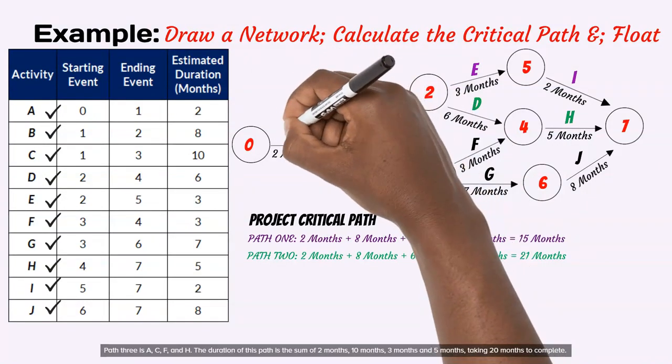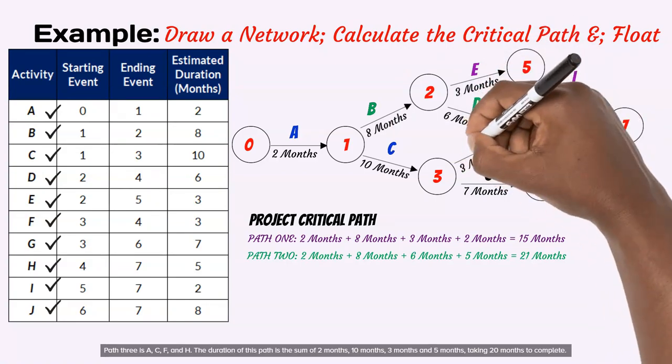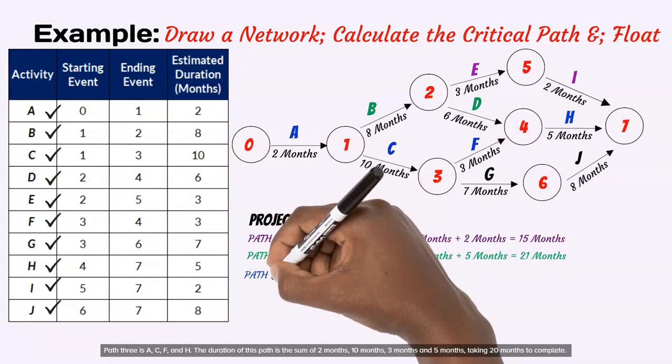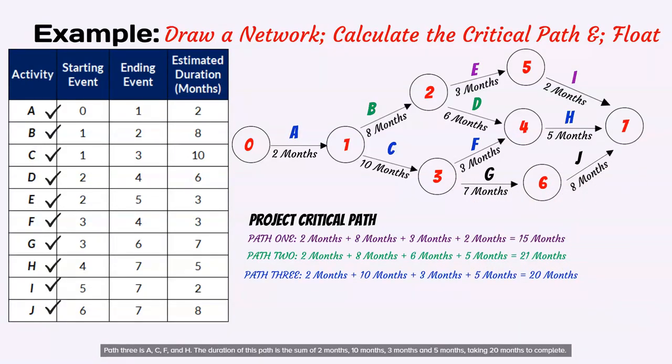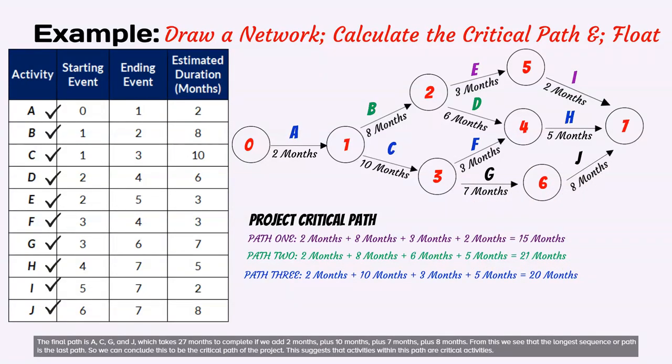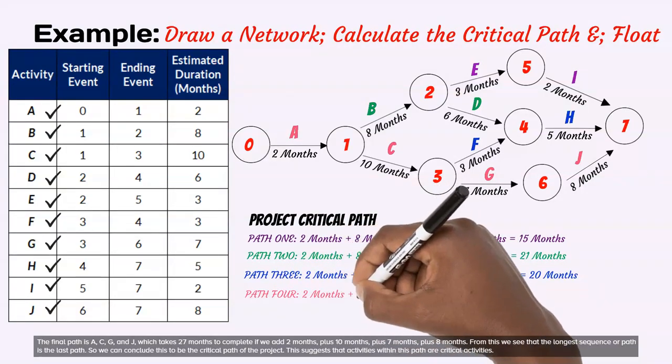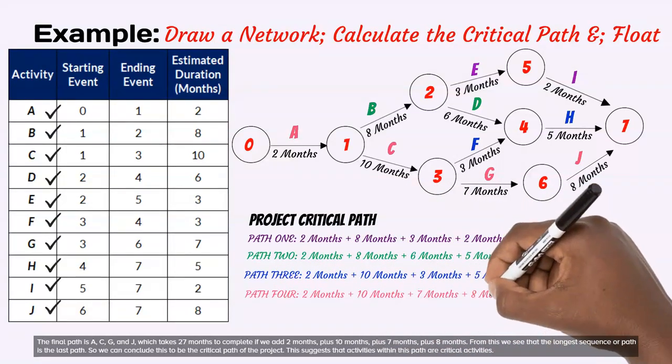Path 3 is A, C, F, and H. The duration of this path is the sum of 2 months, 10 months, 3 months and 5 months, taking 20 months to complete. The final path is A, C, G, and J, which takes 27 months to complete if we add 2 months, plus 10 months, plus 7 months, plus 8 months.